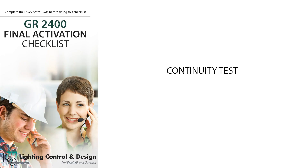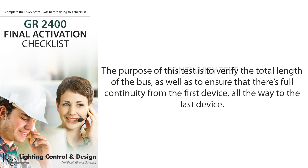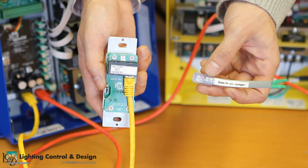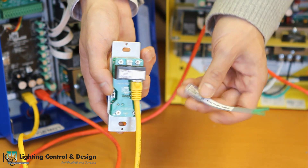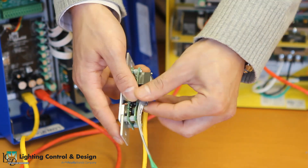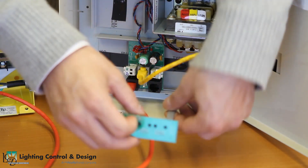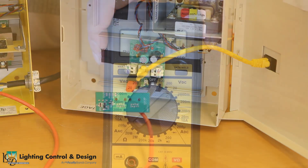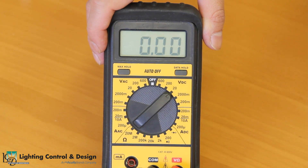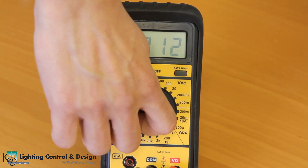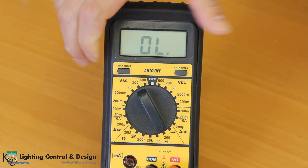The first test we are going to perform is the continuity test. The purpose of this test is to verify the total length of the bus, as well as to ensure that there is full continuity from the first device all the way to the last device. The first step is to plug in the data power jumper into the last device, then plug in the bus checker card into the first device. Set your multimeter to the 200 ohm or equivalent range, and measure resistance across the following terminals on the bus checker card.